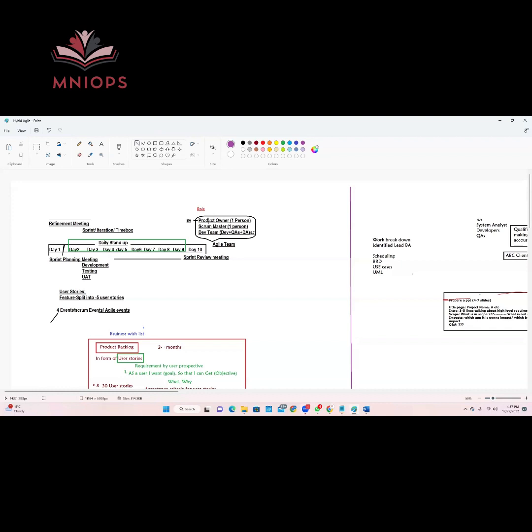So for product owner, here we have only one stakeholder. Okay. And only one stakeholder is the product owner. So one person. So there are no big stakeholders that they have to go to for the requirement. The product owner is a stakeholder representative. The product owner has authority to give work, that is, define the features, define what the business need is, and also accept the work that this development team does. Okay, so one person has the authority to give the requirement and accept the work.